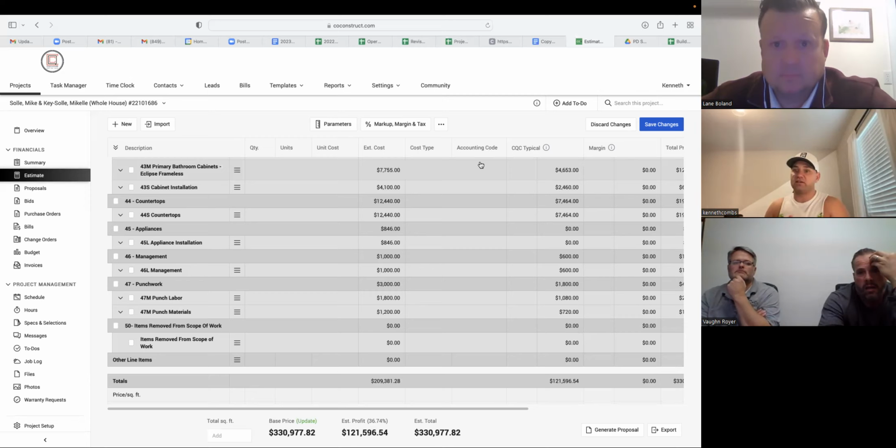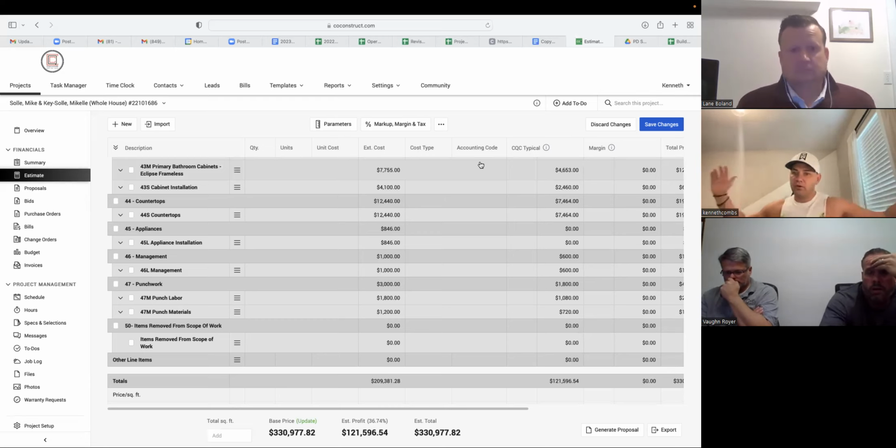And then, once you've actually done some existing conditions, done your first red line, your first draft, you're starting to build out a rough budget. Remember, you and I talked about this last time. I know in a kitchen, a plumber is going to cost $5,500. I know in a kitchen, this size cabinets are going to be roughly $25,000. I know the hardwood floors are going to be $7,000, roughly, right? You build that out, you get those pieces, and between that and the designs, let's say they come in and say, we want a 60-inch dual fuel, large hood, tile backsplash, whatever. That's grander than what you were expecting it to be. That probably adds 15,000 to that number.